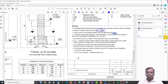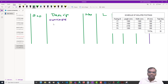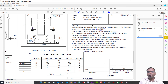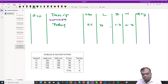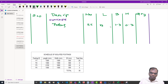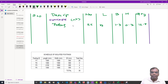Coming to the drawing, the column size is given as 1300 by 1300. There are about 25 numbers. So directly I can give footing 25 numbers, length is 1.3 meters, breadth is 1.3 meters. The depth of footing is 0.3 meters. I am getting 12.675 cubic meters - I am taking it as 12.7 cubic meters. The unit is meter cube. This is footing F1.